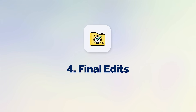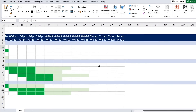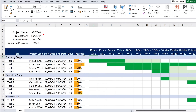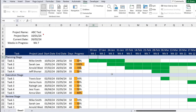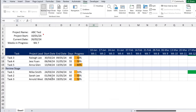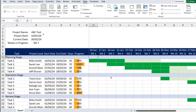In the final stage four, we have two main tasks. The first is enabling smooth scrolling: in cell H9, go to View and click Freeze Panes. Now you can scroll sideways through the weeks while the task names and dates remain visible on the left, and scroll up or down through tasks while headers stay fixed.